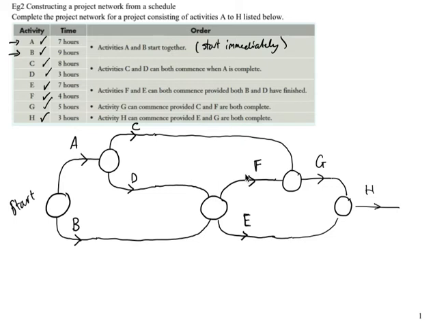So we've got our network, but you may note we have a start and no finish. So whatever arcs you have left over, you just connect up to the finish line. In this case, there's only one arc, and that arc is H. But if you had G's poking out as well, you connect that up to the finish as well.